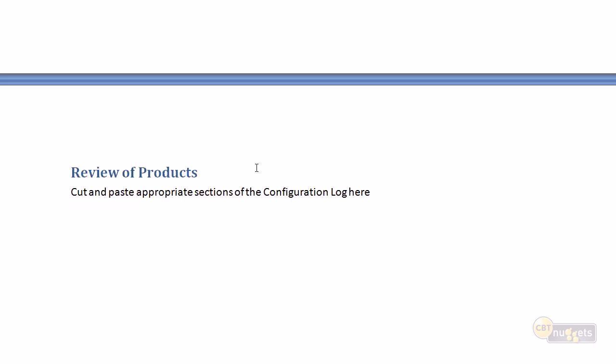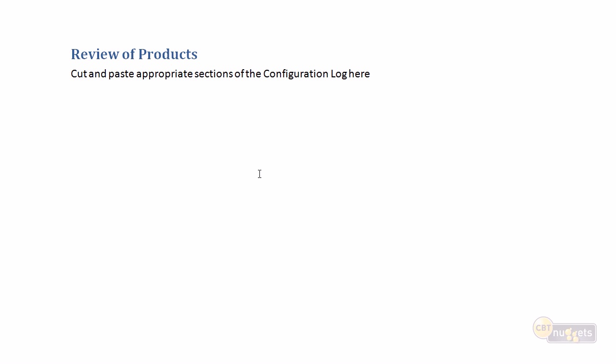And then finally, as in the last one, a review of the products, and we're going to cut and paste the appropriate sections from the configuration log and paste it into this particular document. End of stage, very similar to the end of project, simply a little more detail to deal with the fact that the project is still in flight, and we need to recognize how we're going to continue to successfully deliver our project.